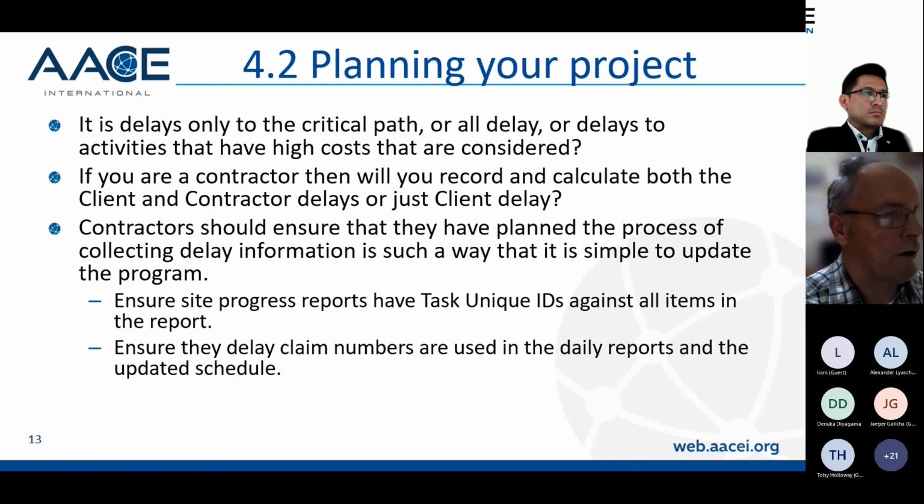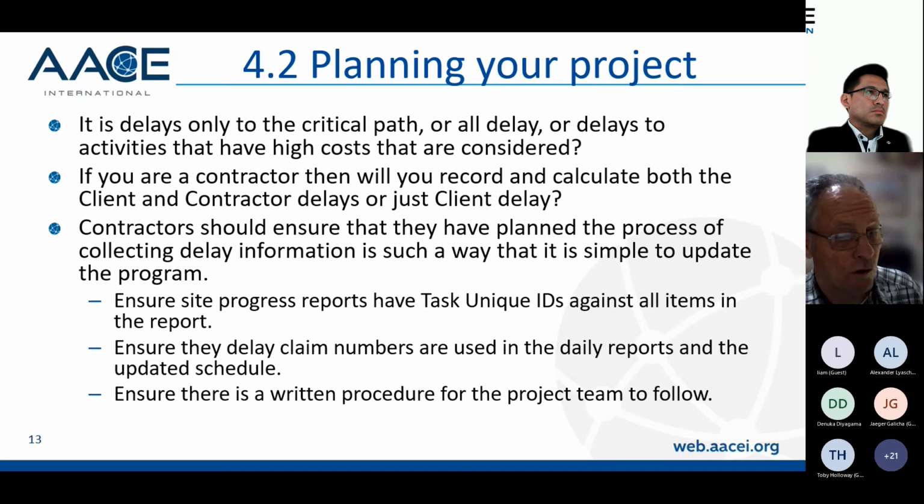So you need to have a cross-reference between the program, the activities in the program, the daily reports, and the claim numbers. Ensure there's a written procedure for the team to follow, so the project team has a procedure. Often you have people on site who are not experienced people. And certainly the first job I had, my company director gave me a set of procedures and said, Paul, you follow these procedures. If you don't follow these procedures, then you get fired. And that's how I learned to do this sort of work initially.